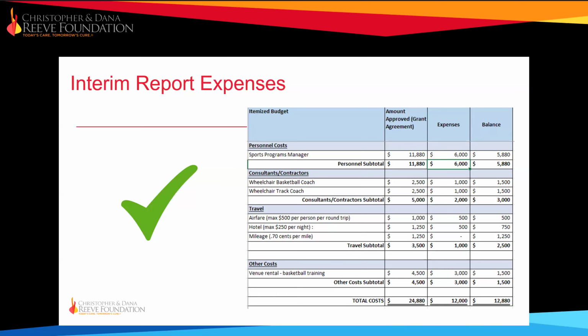That said, prices can fluctuate, and you may need to either use other funding sources to cover any increased costs or reallocate funds within the project so the project itself absorbs the additional expense. If you choose to use other funding sources for the overage, please ensure that the expense does not exceed the amount funded. Do not include costs beyond the allocated funding.